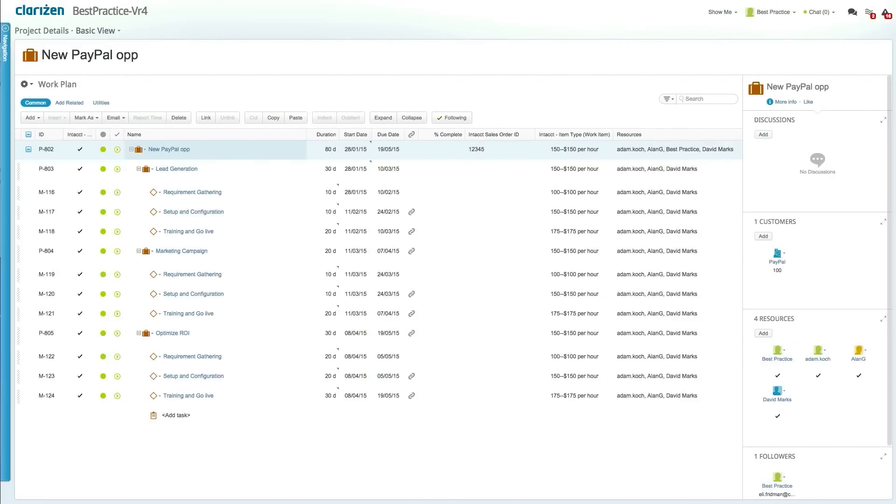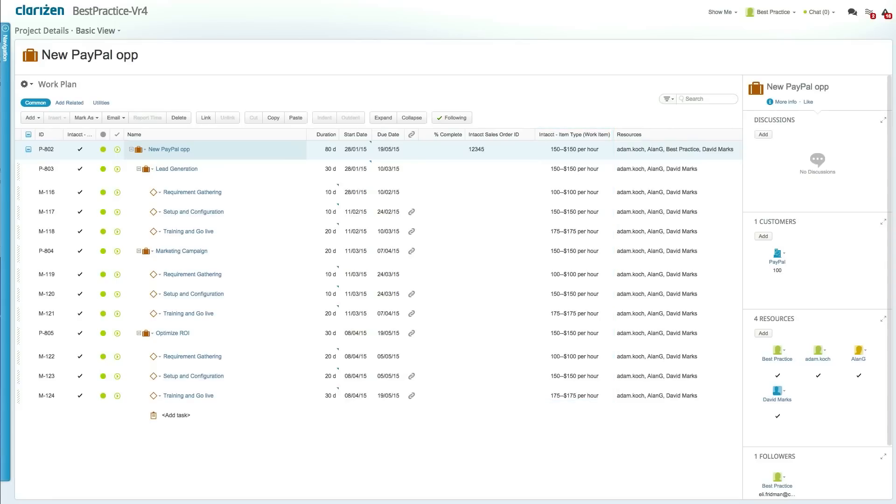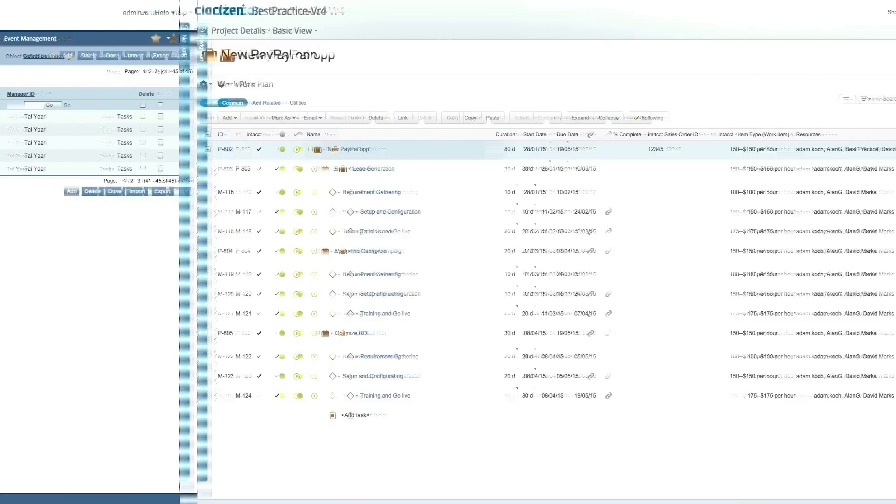At this point, the project manager in Clarizen plans the projects and adjusts the project scheduling, resources, etc. In addition, the project manager selects the relevant Intact item within the tasks and the project resources, which dictates the billing rates in Intact invoicing.